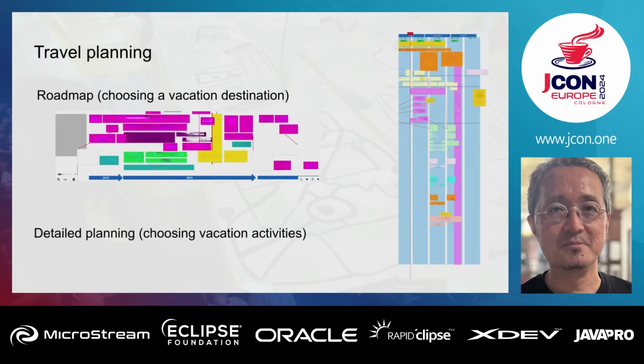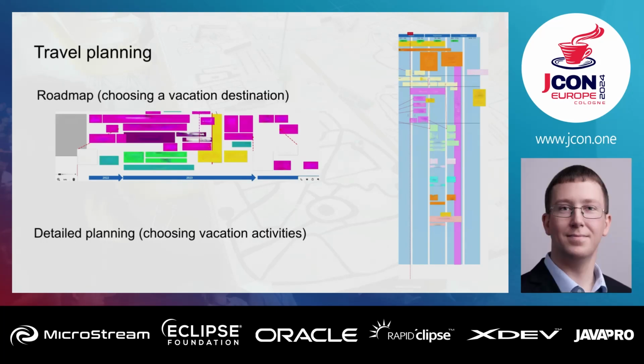Now, the roadmap is rather coarse-grained. It defines milestones, it defines packages of work, but it doesn't talk about tasks that much, and therefore you have to detail that. And that's what you can see on the right-hand side here. Now we did a lot of planning regarding what to do in what sprint, defining dependencies between the tasks, having a look at which personnel was present in which month and who could do what, and to actually assign work. And it also could be holidays, right? Holidays and whatnot, illness.